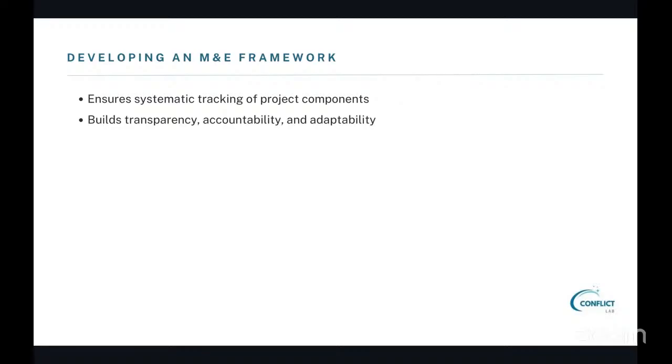So the second part would be, once obviously you know what your risks are for that project implementation, then you measure, for example, high, medium, or low. What are the chances of this risk actually happening? Is it high or medium or low? And then you give a mitigation strategy, which is, hey, this is what we are going to do in case risk 1 happens, irrespective of what the level of risk is.